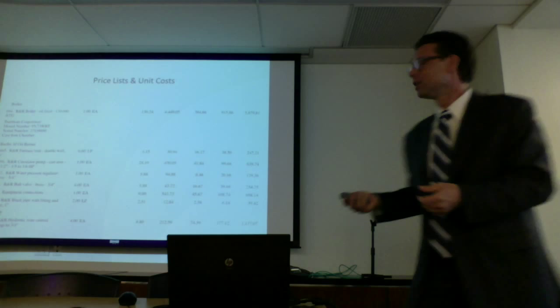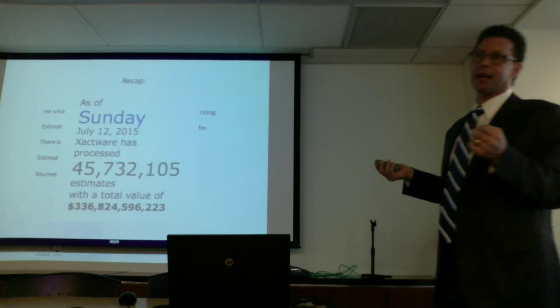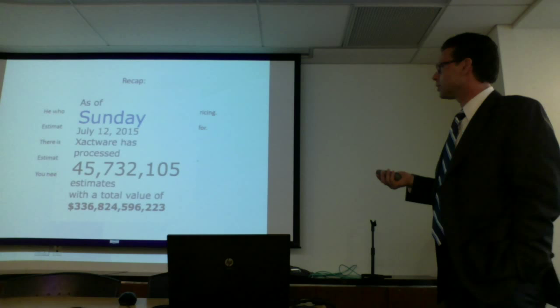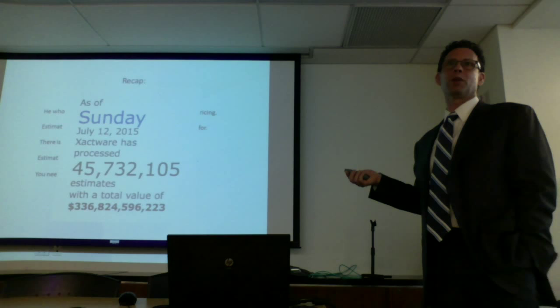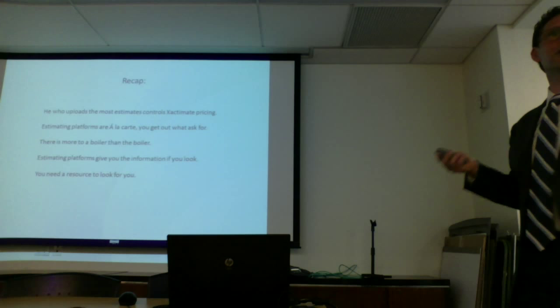So recap, he who uploads the most estimates controls Xactimate pricing. As of yesterday, this is from Xactware, 45 million estimates were processed with a total value of a lot of money, trillions of dollars. Every one of those estimates that is uploaded without changing a price and putting a bid item in will artificially repress pricing moving on for however long. Estimating platforms are a la carte. You get what you ask for.